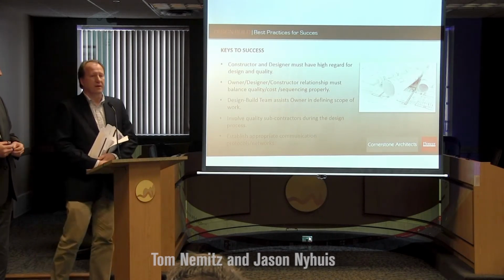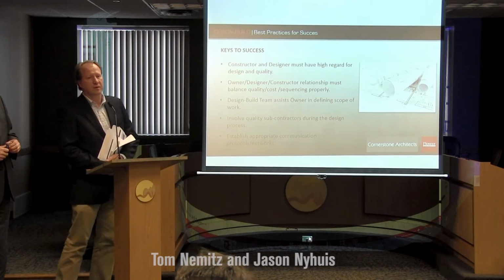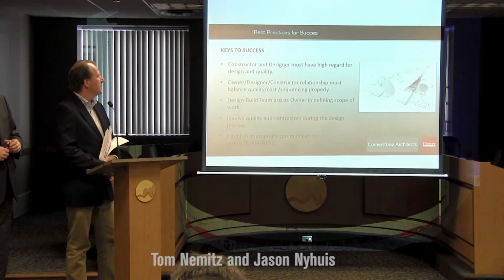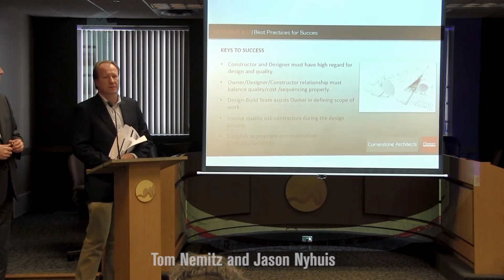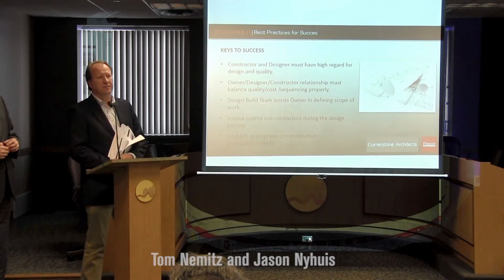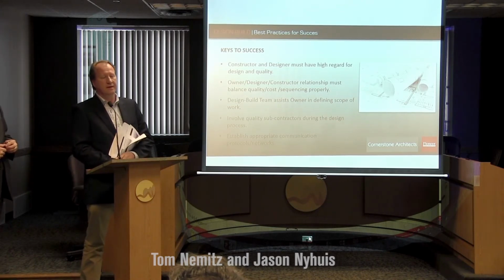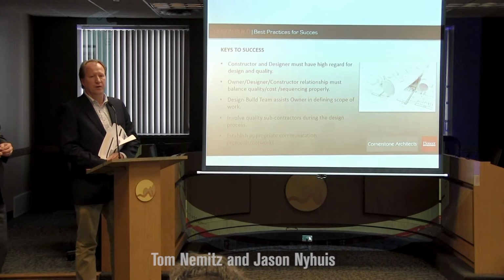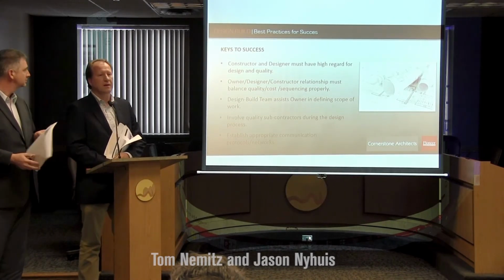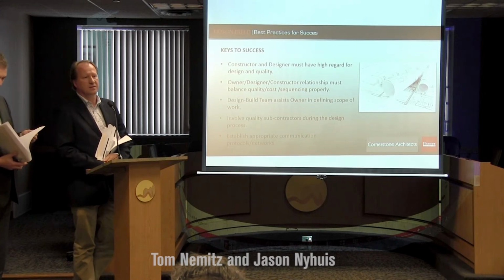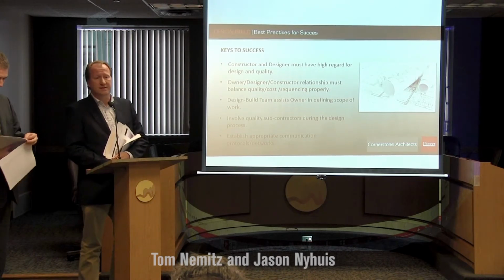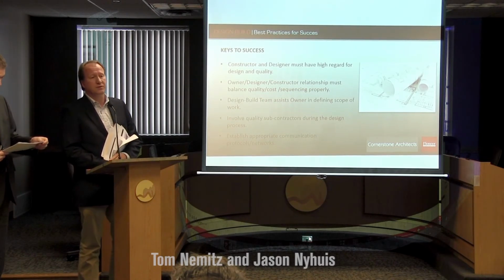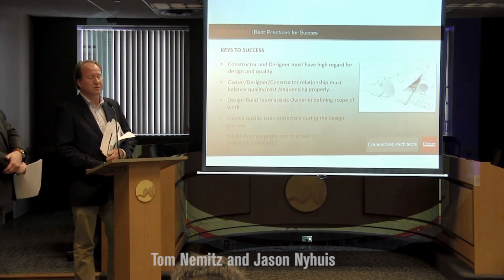As we had mentioned before, there has to be that mutual respect for all the team members and what they bring to it. There also needs to be an established cost and budget right up front. It should be stressed that the budget established up front really needs to be a realistic budget. This is not a bidding phase, so this is the information phase where we all want to know what the real costs are. The costs are what they are, and we want to determine those as early and as often in the design process as possible for this to work.